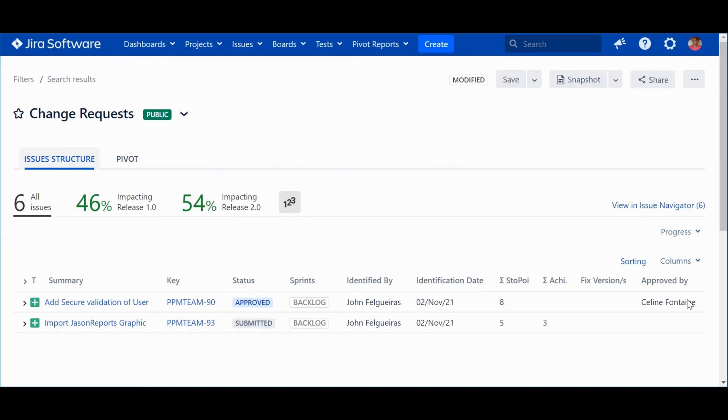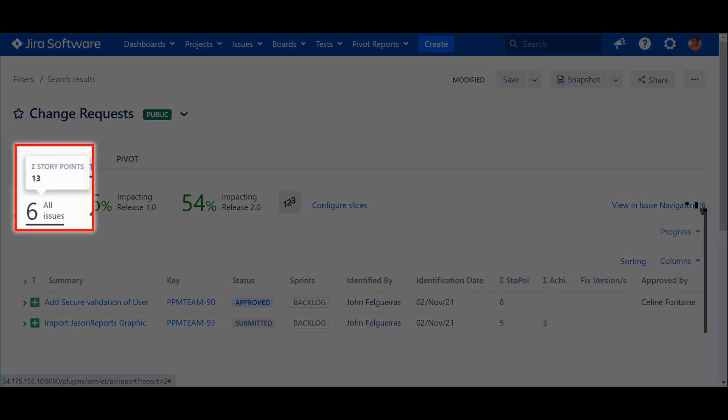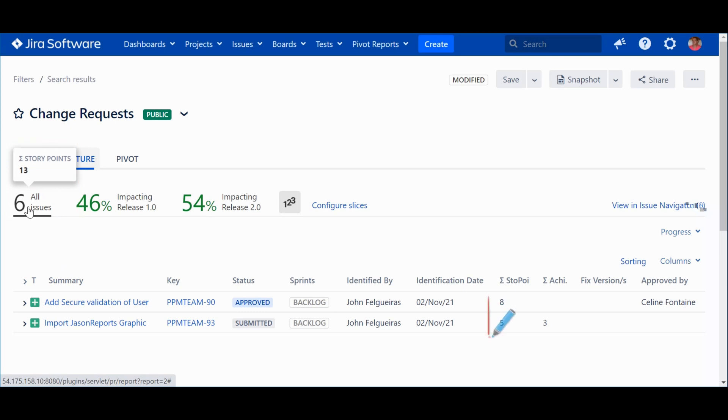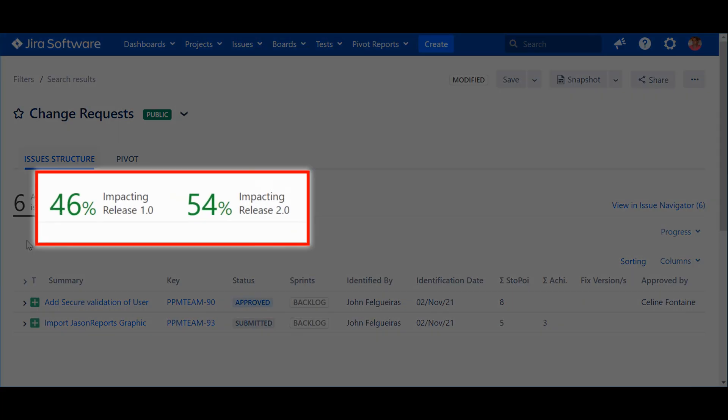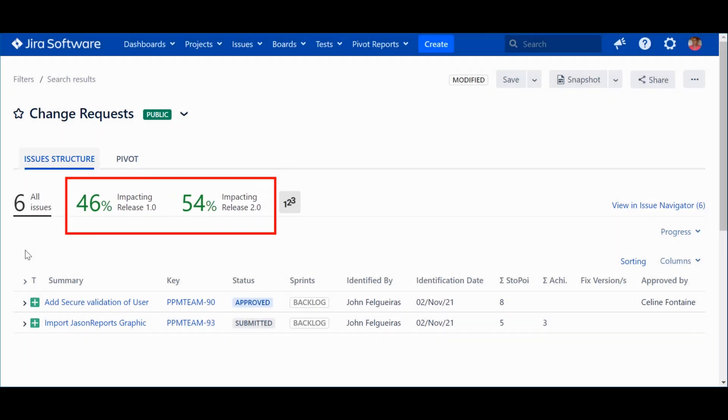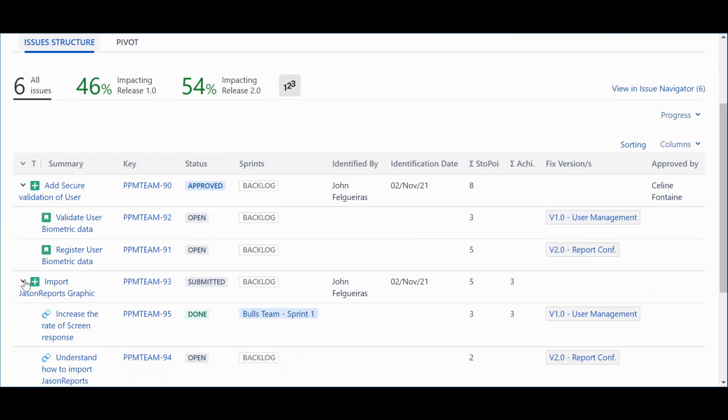In this report, produced with Pivot Reports plugin, we can see an example of how the use of links can give us really interesting information. In this case, we can see that the change requests have a total weight of 13 points, 8 for one and 5 for the other. We can also see that the total impact of change requests, 46% is for Release 1.0 and 54% is for Release 2.0. Of course, we can get a little more detail on how each item can contribute.